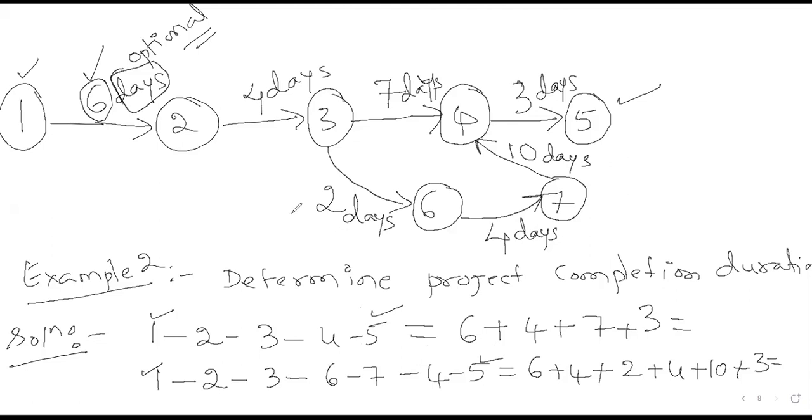For both things to happen, the previous two activities are required. Even to start the hiring process, setting up of the office and the second activity are required. Similarly with advertising: if the company has to start the advertising campaign, setting up of the office and the second activity are required. That is the reason the first and the last node is required for almost all the paths, so make sure the first and the last node is mentioned in each path.